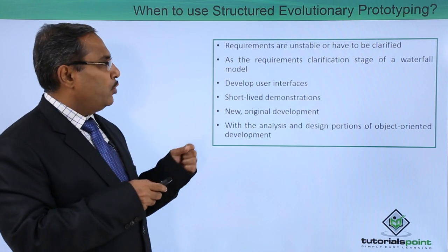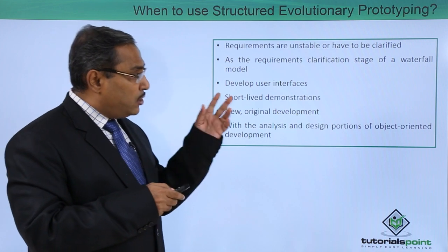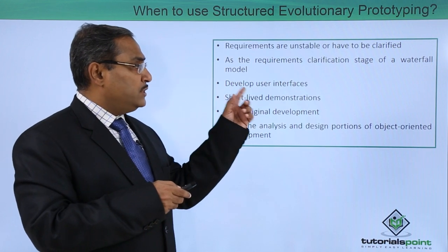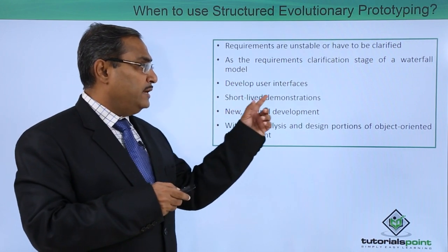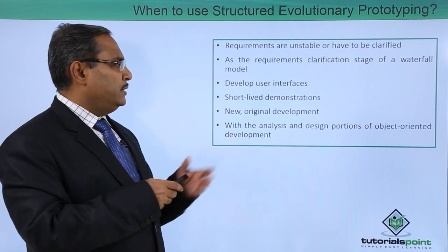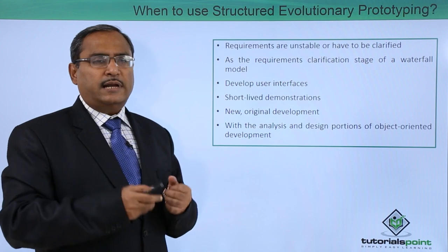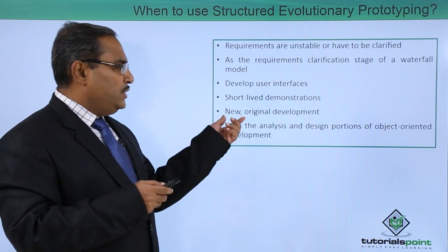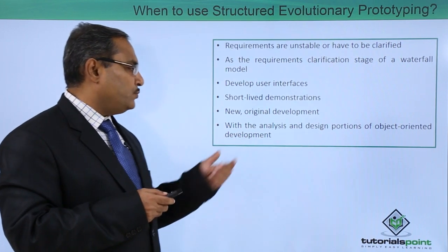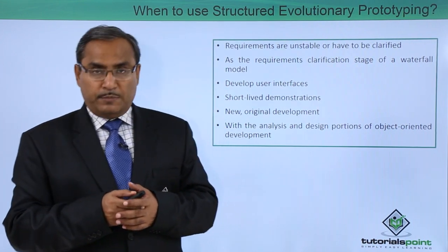When should you use this prototyping model? When requirements are unstable or need to be clarified — at the requirements clarification stage of a waterfall model. Also for developing user interfaces, short-lived demonstrations, new original development, and during the analysis and design portions of object-oriented development. These are the cases where the prototyping model can be implemented.